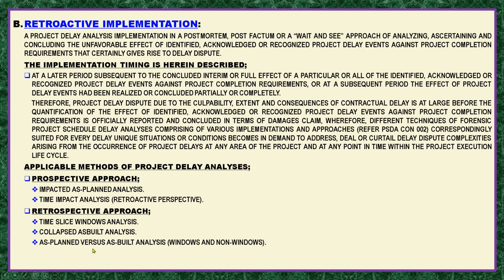Third is the as-planned versus as-built analysis, which we can also implement in windows and non-windows approaches. And then we have the retrospective longest path analysis. And the other one is the contemporaneous period windows analysis. That is in a retroactive perspective.